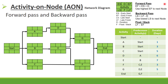The activity will be presented by a rectangle with the activity name in the middle, the duration of the activity right above it, and the early start and early finish. We'll also calculate the late start, late finish, and the float. The float is calculated by the late finish minus the early finish. When doing the forward path, the highest early finish will go to the next node.